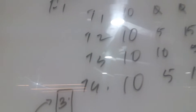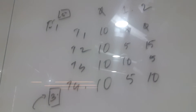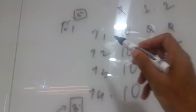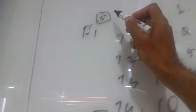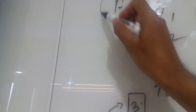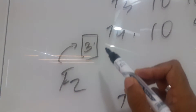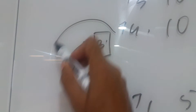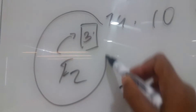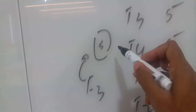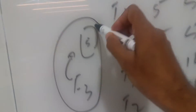Let us see how we really update the burndown chart. We have feature 1 with a story point of 5, feature 2 with a story point of 3, and feature 3 with a story point of 5.